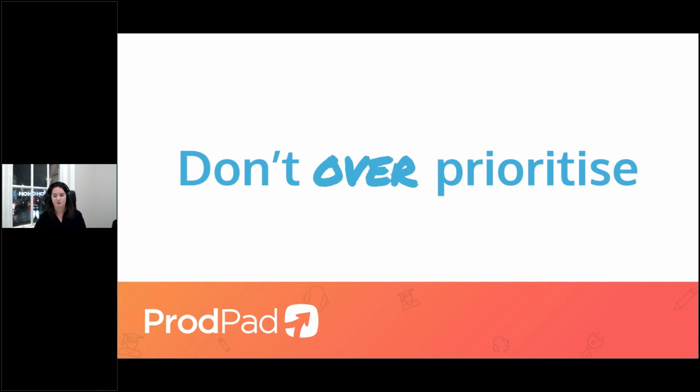Reality is that if you're trying to work out what goes next into development, you really only need to figure out what's happening in the next sprint, and enough work to keep the developers busy for that, and figure out what the next big problems are for the company to tackle, and the next problems after that, you need to check your assumptions on. But it doesn't really matter what's below that line, because by the time that sprint is out, you now have the chance to go back, check what was actually working or not, and go reprioritize. You're constantly going to be prioritizing.